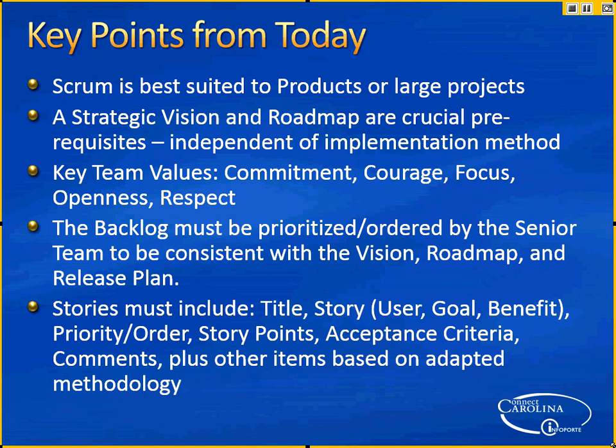And as people start delivering that code, you're going to be testing it during the sprint as the stories get completed. Hopefully all the stories don't all come out at the end where we've got a problem. You want them to be small enough that they're coming out incrementally and you have time to test it. The change management team has time to see it actually coming out. They already have an idea because the story's been defined. So all that is happening in cycle. It's not like at the end of the sprint we hand it over to test and wait for their feedback. No, it's all part of the same process.